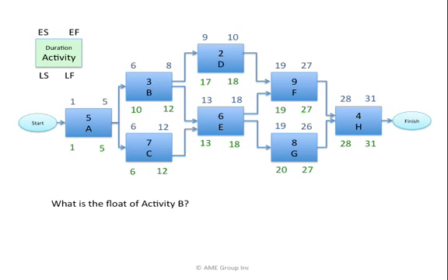Now really, to answer the question, what is the float of activity B, I didn't need to figure out the late start and finish of A or C. I just needed to go back as far as B.